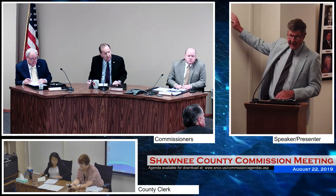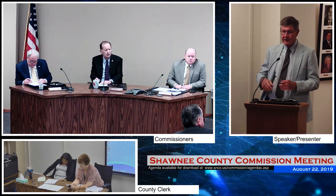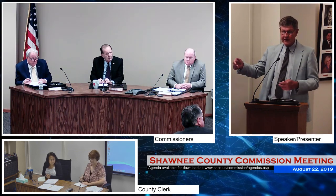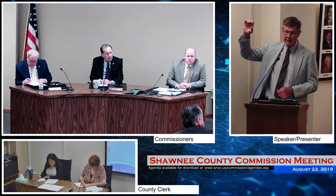It was the lowest. The automatic fire door closures need to be put on doors that have no back wall to put a magnetic holdback, which are much cheaper to put on. But at like the Sunflower Ballroom, the doors open just out into the hallway, and you have to have something to hold those open, which is built within the door closure as a magnet. So they're a little more expensive, and there's 21 of those at Maynard and 5 that we can actually do the less expensive magnetic holdback that will release when the fire alarms are triggered.